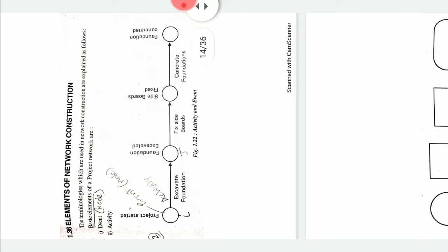A significant event must be positive, specific, tangible, and meaningful to the project. It should be definitely distinguishable as a specific point in time. It should be readily understood by all concerned with the project.